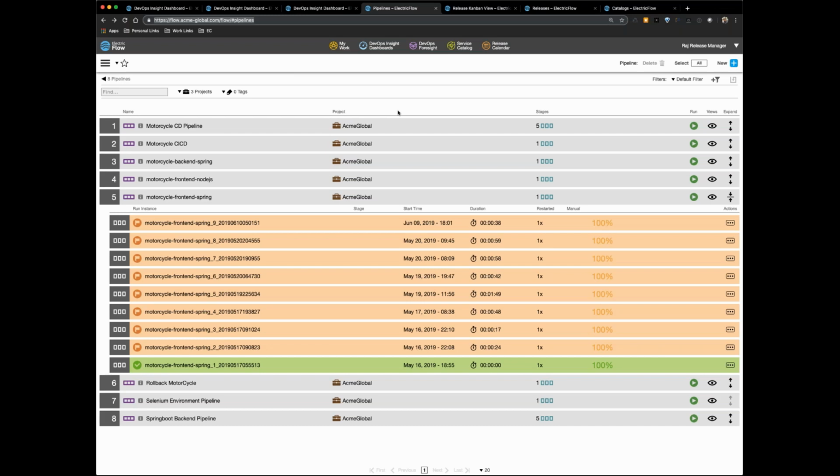The other layer of dependency management comes at the release layer. So if you have one release with 5 applications and another release with 3 applications, if release A is dependent on release B, none of those 8 applications will go to production unless all 8 have met your criteria successfully before being pushed to production.